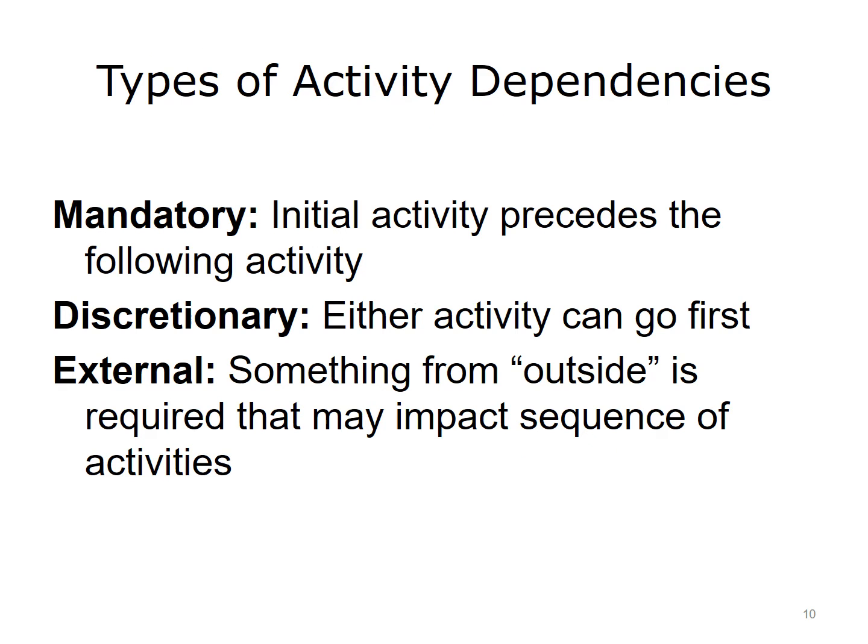You must know dependency determinations between activities when preparing a schedule and understand the relationships between activities. That is, it is very important to understand the relationships between all of the activities in the projects before you can produce an accurate schedule. Activity dependencies fall into the following 3 types. In a mandatory dependency, the activity sequence is inherent in the nature of the work performed. The initial activity must be started or completed before a following activity can begin.